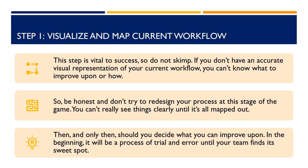Step 1 requires that you visualize and map the current workflow. This step is vital to success, so do not skimp. If you don't have an accurate visual representation of your current workflow, you won't know what to improve upon or how. So be honest and don't try to redesign your process at this stage. You can't really see things clearly until it's all mapped out. Then, and only then, should you decide what you can improve upon.